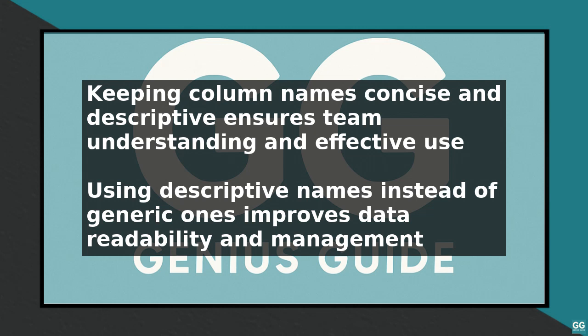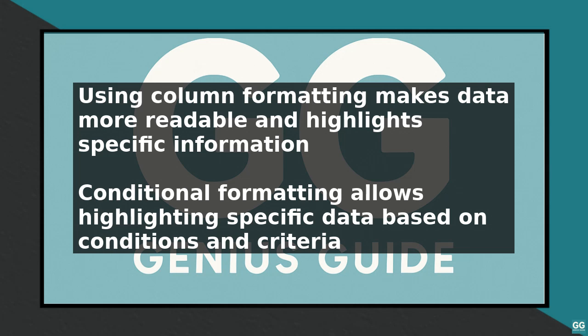To take your columns to the next level, you can use column dependencies to create relationships between columns. This feature enables you to automatically update data in one column based on changes made to another column. For example, you can create a column dependency that automatically updates the project status when the task status is changed.